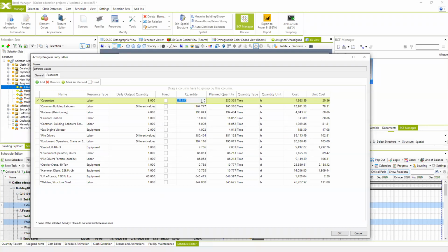So by changing this, we're adding additional information, an additional level of information. So it means that we spent a little bit more resources than we planned. Just by doing that, the system will automatically calculate the price based on the actual resources.